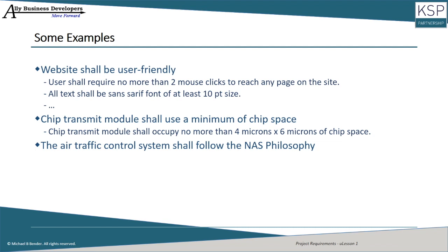So I said, "You know I have to prove that I've met this requirement. Tell me how to prove it." Their response, "I don't know." "Okay," I said. "Well, at this point we have 3 options. 1, you can tell me what the philosophy of the NAS is, and I'll gladly build a system that meets it. 2, we can pull the requirements since it doesn't seem to be very important. And 3, we can go on time and materials contract, but I cannot give you a firm fixed price since I'm not sure exactly what I'm building." Well, they decided to pull the requirement.